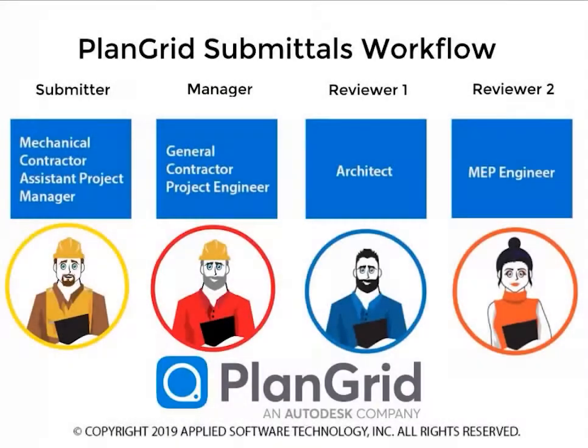PlanGrid Submittals workflow works all the way through the submitter, the manager, any number of reviewers, and then the manager again to publish the submittal.